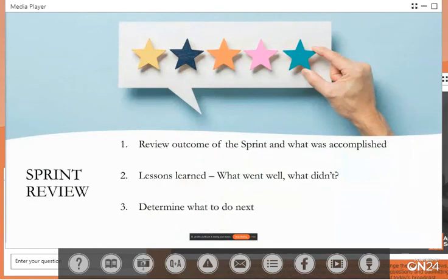Now, going back to the introspection and the self-reflection, we also have the sprint review. The purpose of the sprint review is to inspect the outcome of the sprint and to determine the future adaptation. So the Scrum team presents the results of your work to the key stakeholders. And this is really, really important. How does your office know if you've done your work, right? I made this cool new door family improvement. Let people know. So the sprint review is a good place to consolidate that information, recap, and distribute that information to the office.